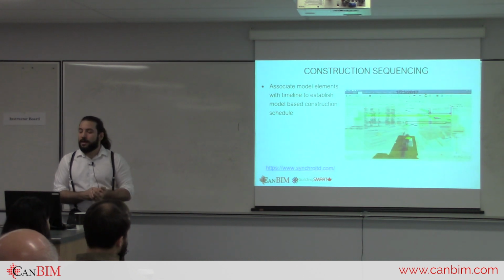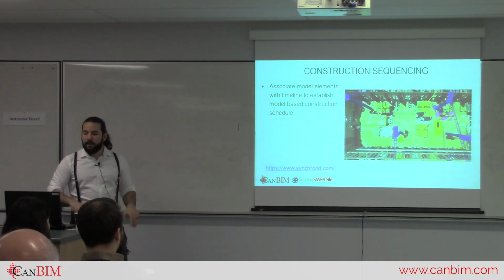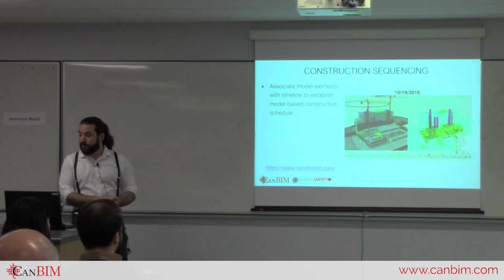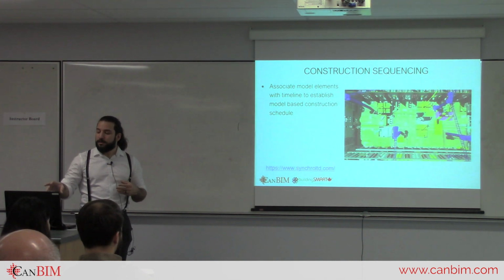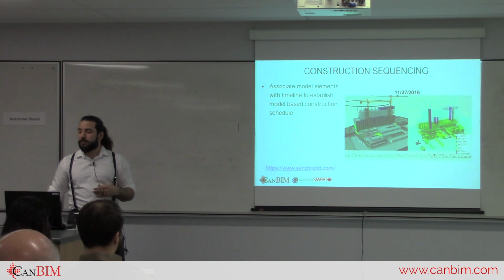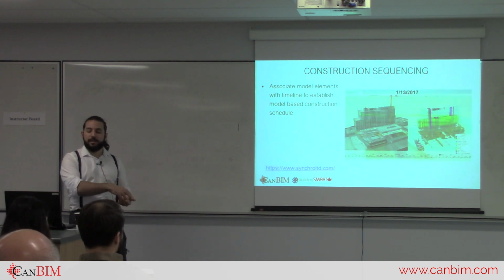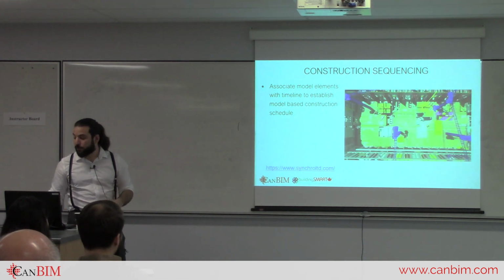And you can now associate those with the building elements in your model and either prepare animations like this, or basically just kind of see visually how it will come together. So now everything in your schedule, or most things in your schedule at least, will be referring to an actual building element. So it's relatively easy to associate them using the right software.